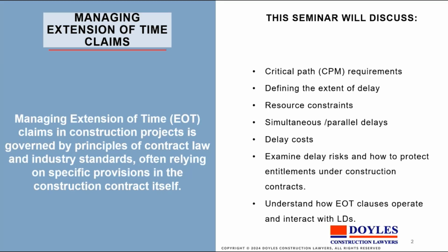The critical path works best when you have a series of constrained steps which must be followed in a precise pattern in order to get to the end result. Some contracts, perhaps the construction of a road, you could start it in the middle, you could start at either end. But on the other hand, if you're building a building that's 30 stories high, then of course you've got to start at the ground floor and work your way up.